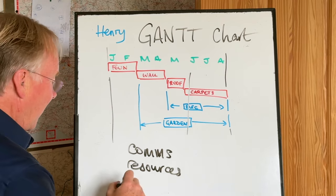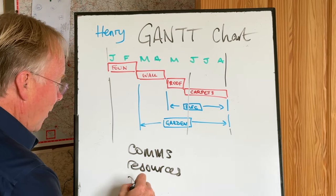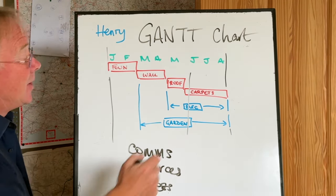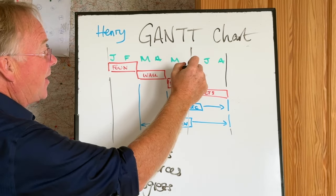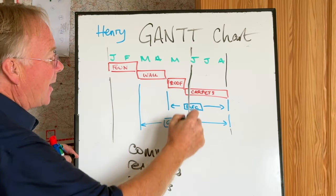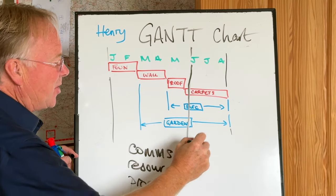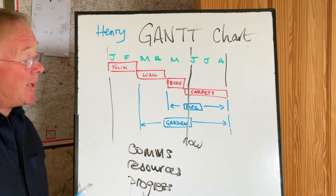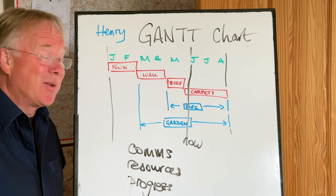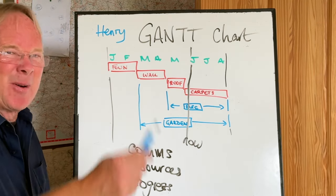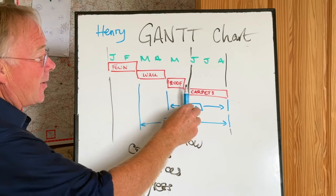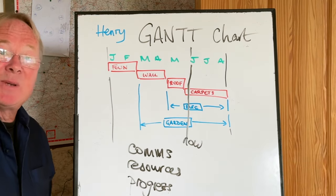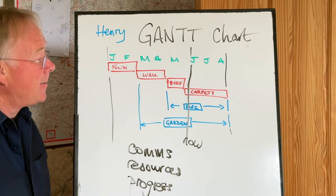And then finally, you can monitor your progress using your Gantt chart. Let's suppose it is June — you have a thing called the Now Line. This used to be a piece of string, but obviously this would all be on a computer now. Excel is probably the best way to do it, but there are software programs that do it. You have the Now Line that moves along, and the game is to try to keep up with the Now Line.